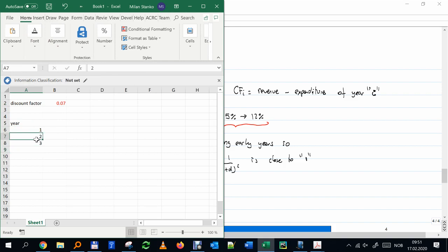By accounting, we have to make like what we have done in the Snow White. Okay, by the end of the year, the first year passed, and I made some expenses and I made some earnings during that year. Okay, end of year 1, and then I have this factor which is 1 over 1 plus d to the power of I.